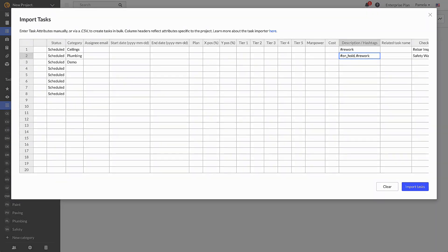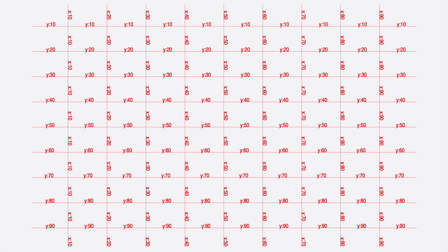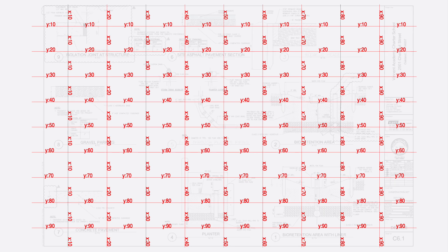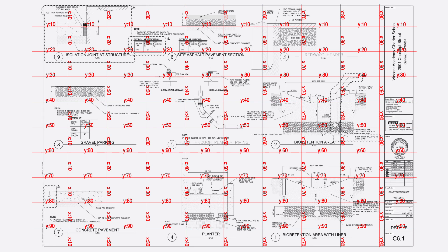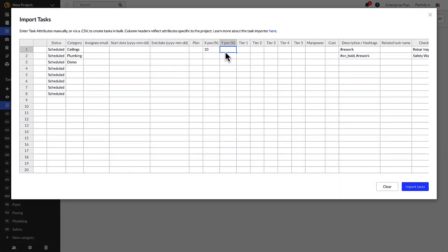Each task can also be associated with X and Y coordinates on a plan sheet. Use the XY coordinate template linked in the description box below to overlay on your plan to determine where your task will be located. For example, to put a task near the top left corner of a plan, input X10, Y20.